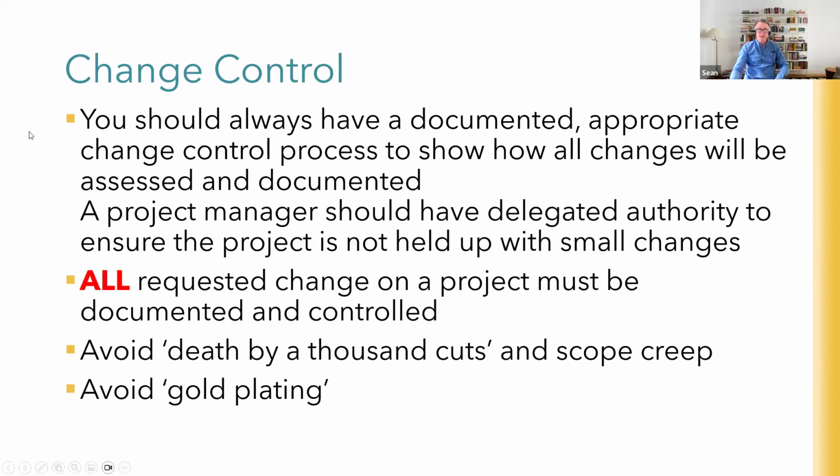Now, the key messages here, and again, this is a very short module, is that you should always have some sort of documented and appropriate change control process. It should be part of your particular project management methodology or methodologies. It should be a clear part of it on how change requests are documented, who can raise them, who can approve them, what's the approval process, how you record them all, like with a change register. That should all be part of it.